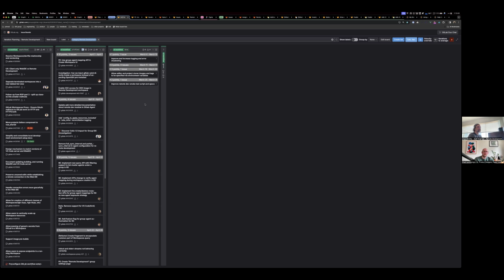It's mashing up the API, reading all the stories from the API, reading the iteration data, which calculates the velocity for past iterations from the API. As you can see, normally closed issues do not show up on boards at all. It's putting these closed issues in there dynamically. If closed issues are in the current iteration, it will show them at the top here. And it's inserting these iteration markers with the correct date spans, number of issues, and the points, all from the data that it calculated from the API. And it just uses the element data, like for example the graph GUID and the issue ID, to know where to jam all this stuff in there and hack it.